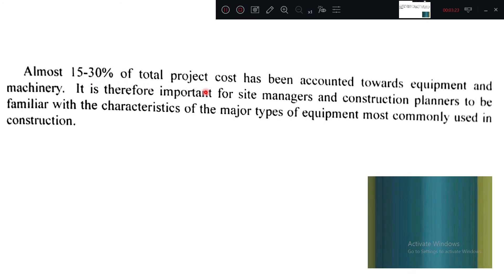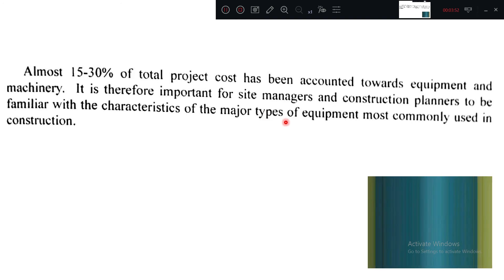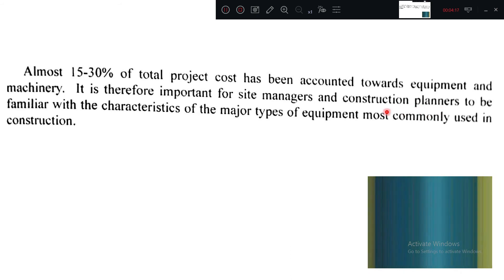Almost 15 to 30 percent of the total project cost is accounted towards equipment and machinery. Previously, labor composition is 15 to 30 percent, material composition 50 to 60 percent, and the remaining 15 to 30 percent goes to machinery and equipment. It is therefore very important for site managers and construction planners to be familiar with the characteristics of major types of equipment — cycle time, operating cost, speed — because these costs are included in the project itself.